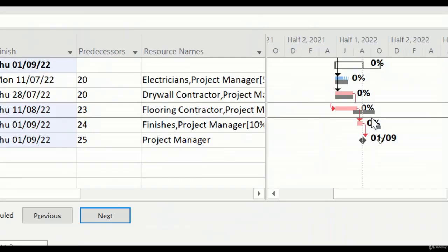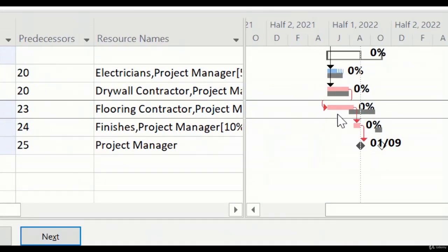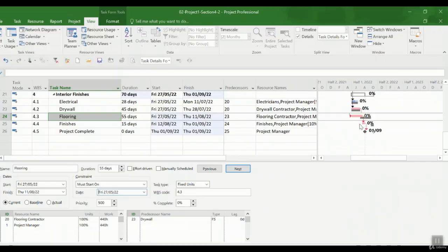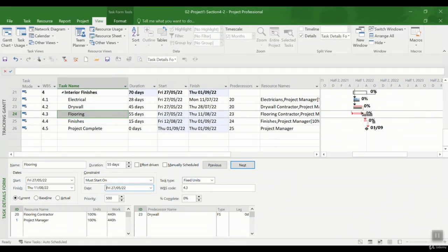You also see that it is completely different from the baseline that we were planning in the beginning of the project. But since we have a deadline, or for example the upper management committed to something, we have to make it happen. We make these two tasks parallel and they should accept the risk. It might cause a lot of problems, but if they accept the risk, you can do it the way it is.